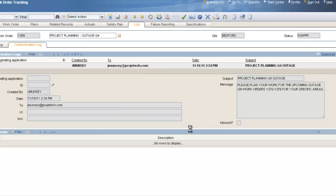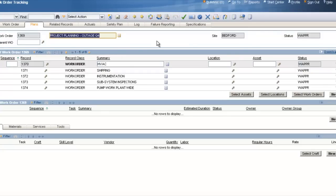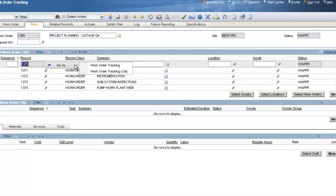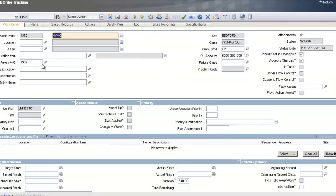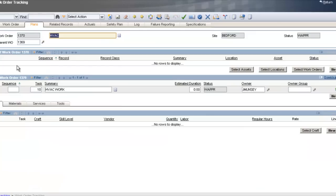I can open it up — this is a permanent record in Maximo, very similar to your sent box. Now let's go back to the Plans tab. I'm going to become the HVAC supervisor and plan out the HVAC work. I'll click on the arrow to the right of my child record to hyperlink to that specific work order — work order 1370 for HVAC, attached to parent work order 1369. On the Plans tab, we'll create child work orders for every job that needs to be done during this outage and attach them to the HVAC department work order.